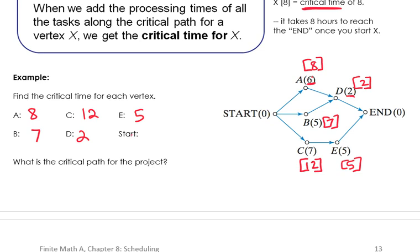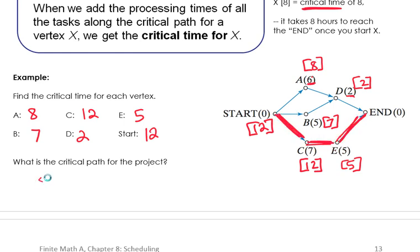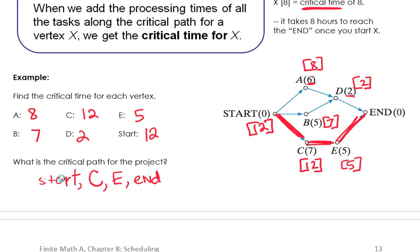What's the longest path from start to end? The route through A takes eight hours, the route through B takes seven, and the route through C takes 12. So no matter how many processors we use, we still have 12 hours worth of work. The longest path from start to end is called the critical path. Start also has a critical time of 12. The critical path goes start, C, E, and end. No matter how many processors I use, it's going to take me 12 hours to do this task. What I'd like to do is set one processor working on the critical path and then use the rest of the time to fill the other tasks in.